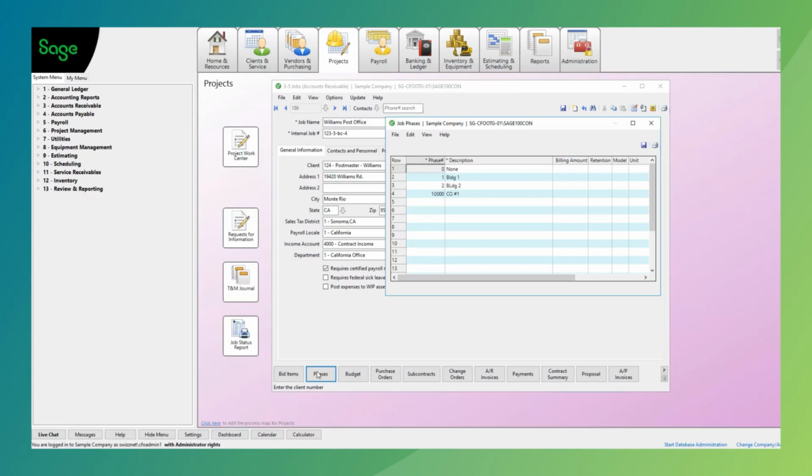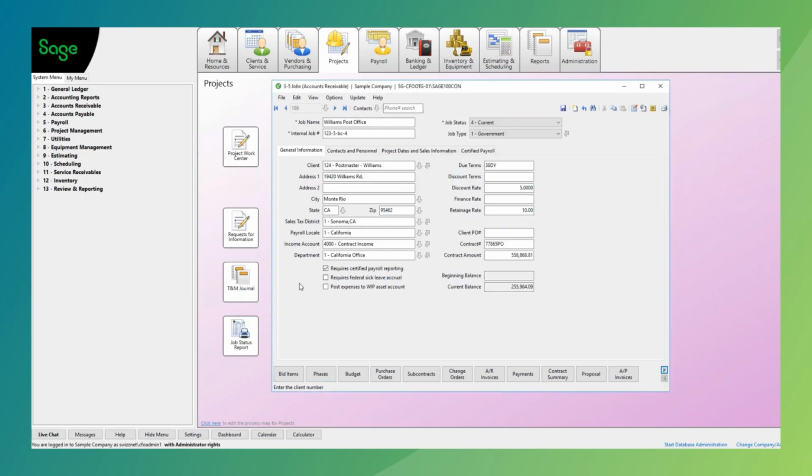They don't even have to be buildings. Say, for instance, I'm working on a gas station. I want to track the parking lot cost and revenue differently from the actual building itself. I may want to track it differently from the landscape. So there are different ways for contractors to set up what are called project phases, a mini job inside of a larger project. Okay.